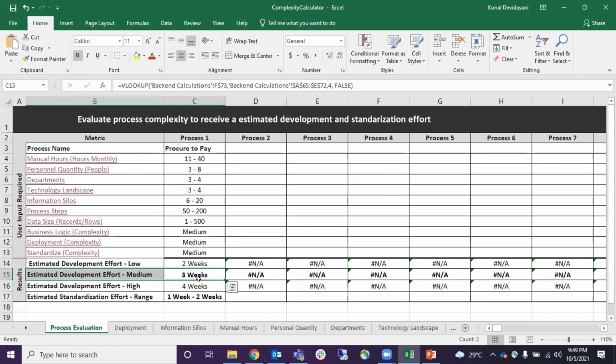We usually have 1 to 3 weeks of documentation time kept, let's say for process PDD and SDD, process definition document and solution design documents. We usually have that time also kept to make sure that we have the right documents captured for our processes. So these estimates we also create when we submit those proposals, which I was talking about, to our clients.